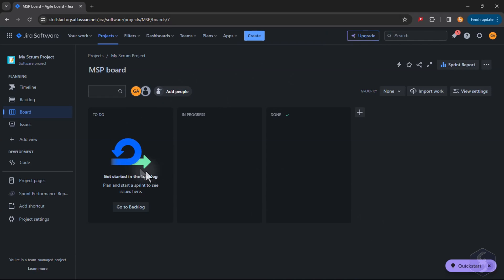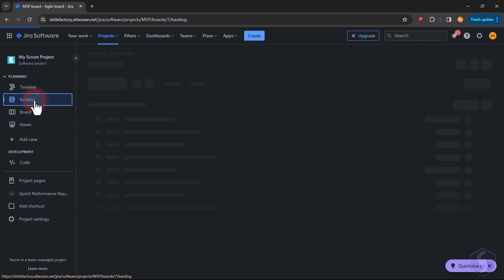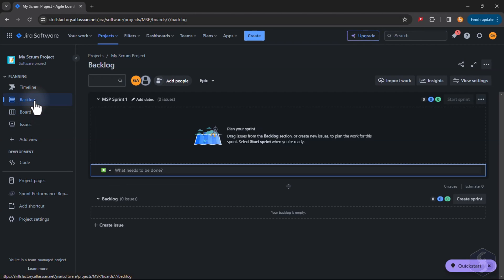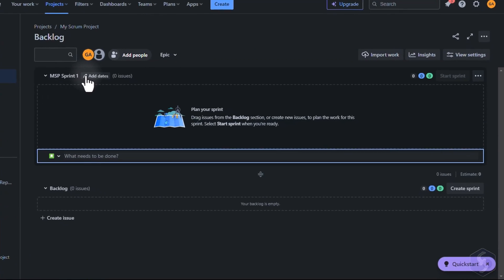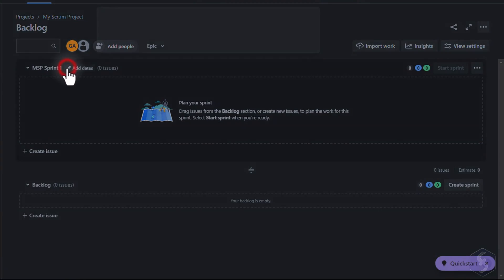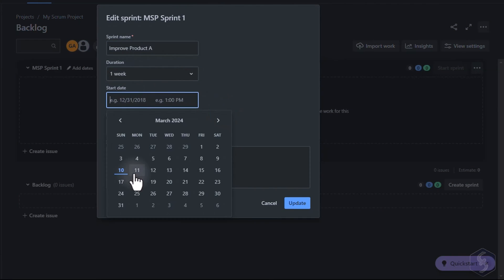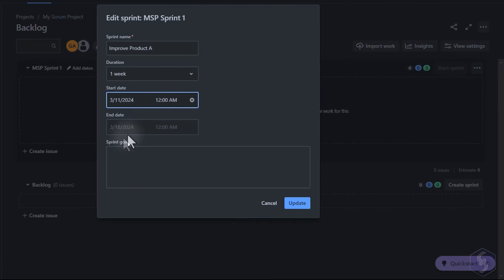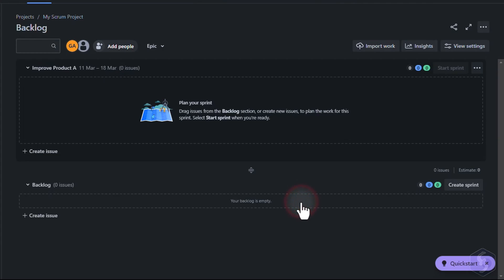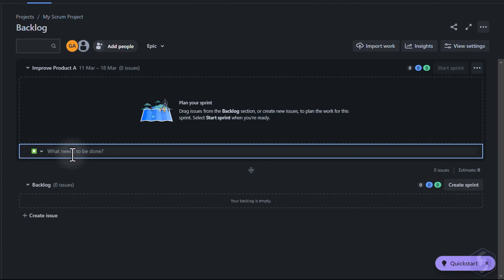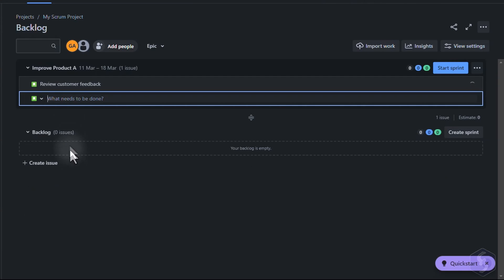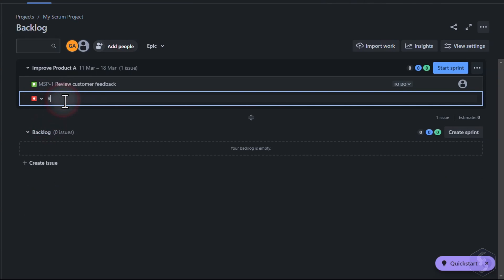To fill the Scrum project, switch to Backlog and Define a Sprint which is a group of issues to be addressed within a specific deadline. Define any task, bug issue or a story issue if it is a non-technical item and apply with the Enter key.